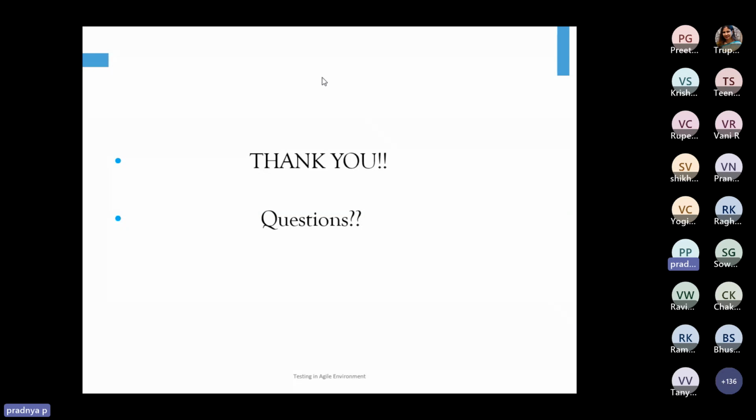Outside that iteration and at a higher level, testing can be done by another team, and the cadence of the development team and testing team can be a little different. The development team may have 2 weeks of iteration and then the later 2 weeks will be the testing team's iteration. That also is possible. But then we are doing post facto kind of testing.